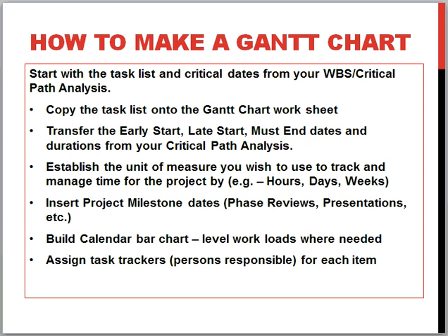Make sure you transfer your early start, late start, and must end dates, and the durations of your critical path analysis. Establish a unit measure you wish to use to track and manage the time on the calendar: hours, days, or weeks. I usually tend to like to use days or weeks, or a combination of both. Then also, once you get the tasks in there and the dates, also insert the project milestone dates.